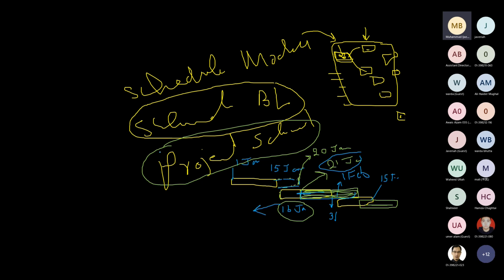During execution, when we go into it, at that time we prefer using the project schedule as the latest reference, right? Although we'll keep comparing our actual performance with the schedule baseline. However, to plan our activities, to plan our work, obviously we just can't rely on the schedule baseline all the time, because things are not the same now. Many activities have been pushed forward.